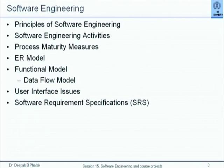We will not discuss the ER model now, but I will describe what functional models are, user interface issues, and specifically a key document called the Software Requirements Specification or SRS document. In professional projects, not a single line of code is written until the entire analysis and design work is completed. Coding actually constitutes roughly 10 to 15 percent of the total software development effort. You will do a large amount of programming work, but you must get a glimpse of these other activities.